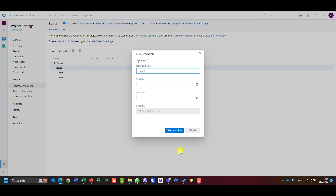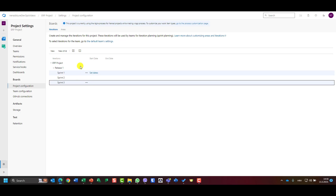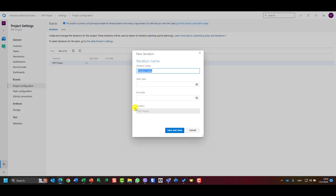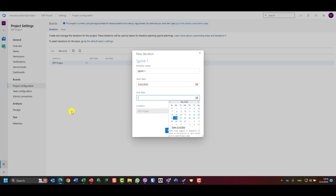Basically, I can have multiple sprints under one release, or keep it simple. I'll delete the release hierarchy and create Sprint One directly under the ERP project. Today is the 15th of May, so the sprint starts Monday the 22nd of May, lasts two weeks, and finishes the following Friday.